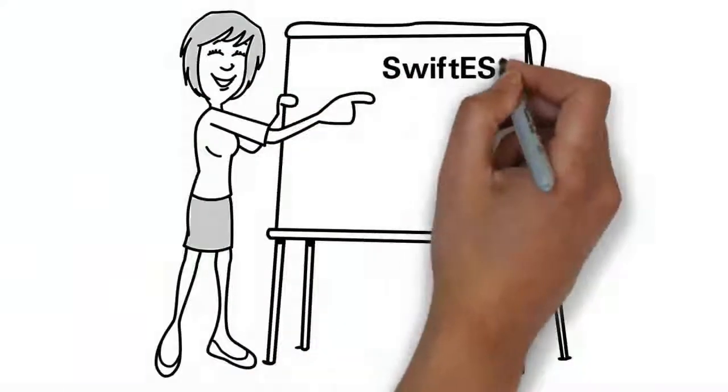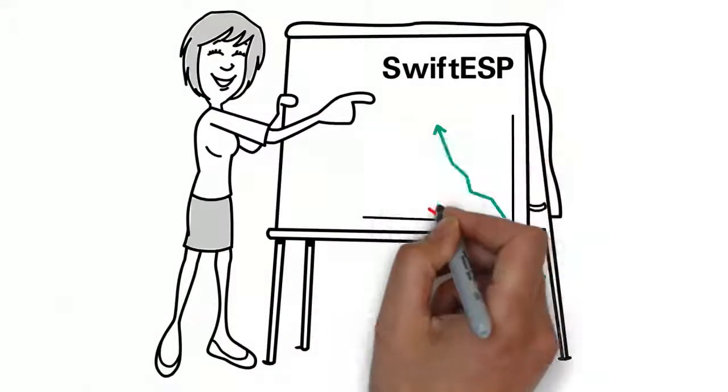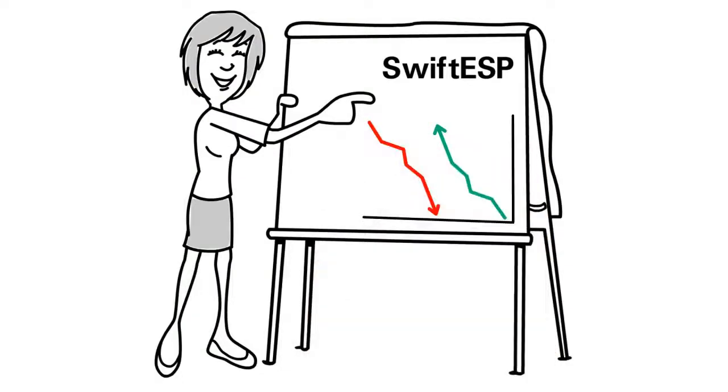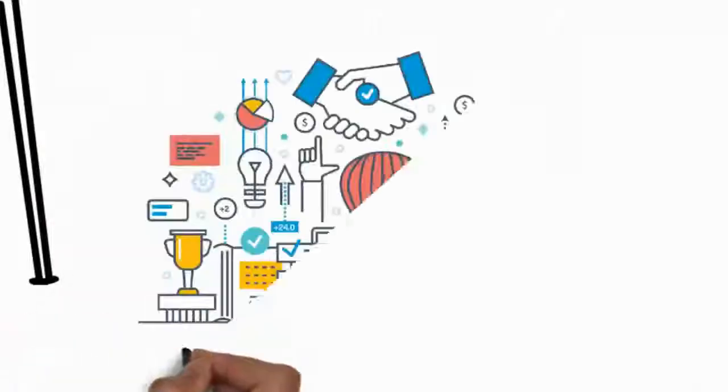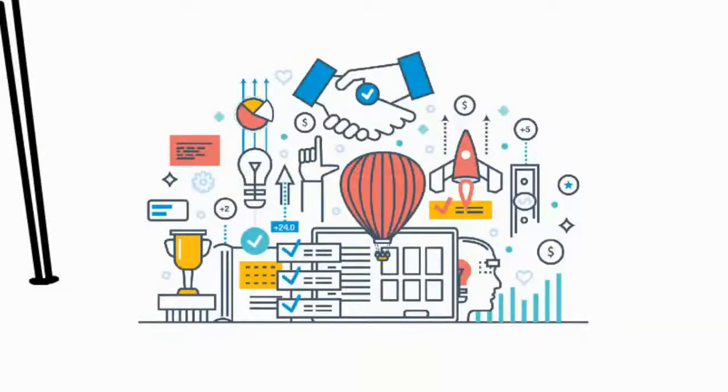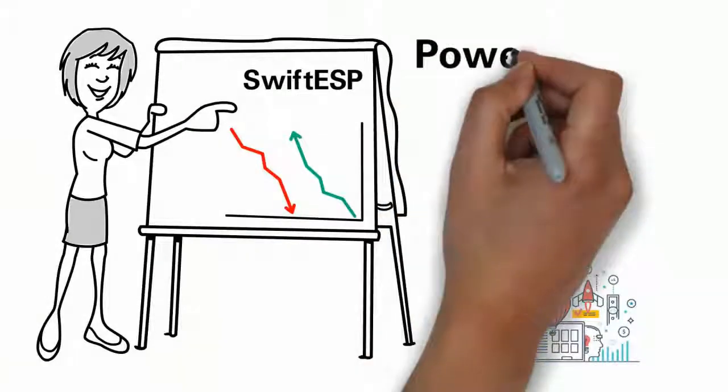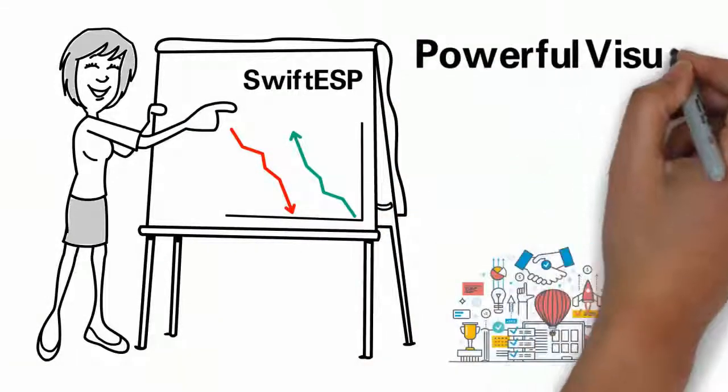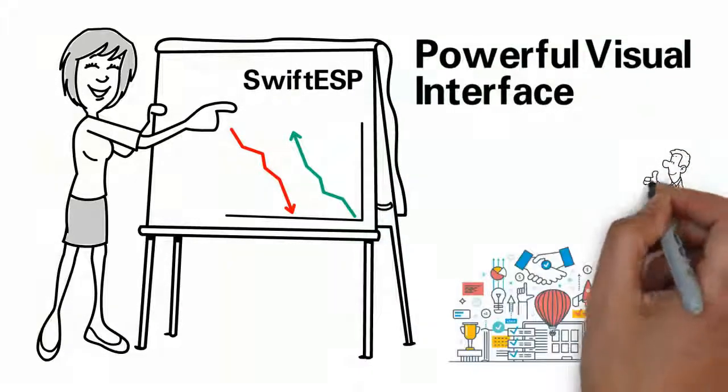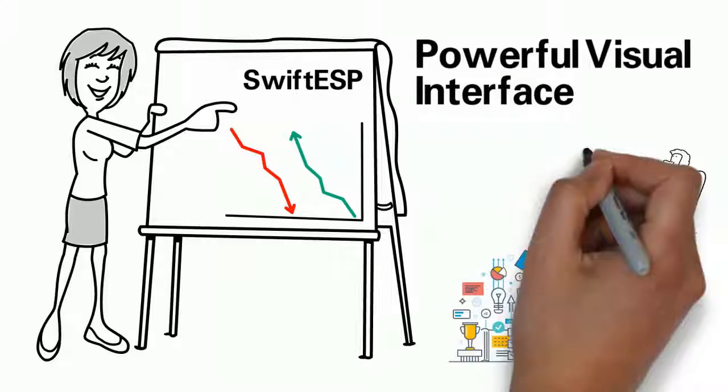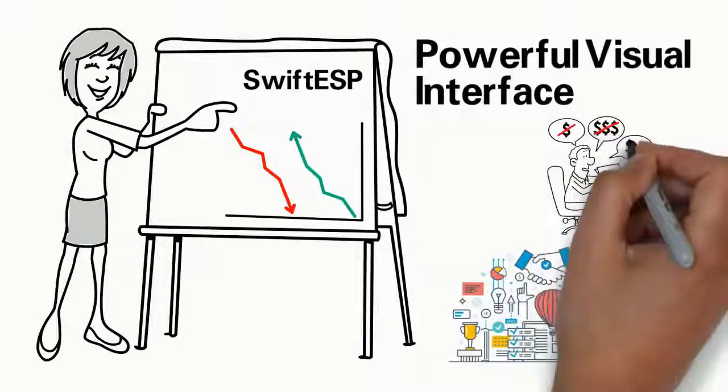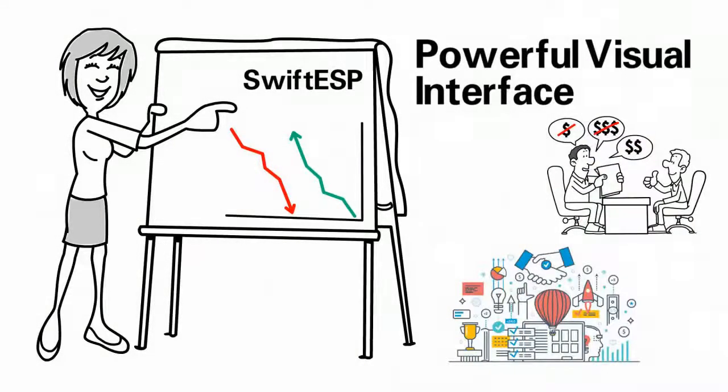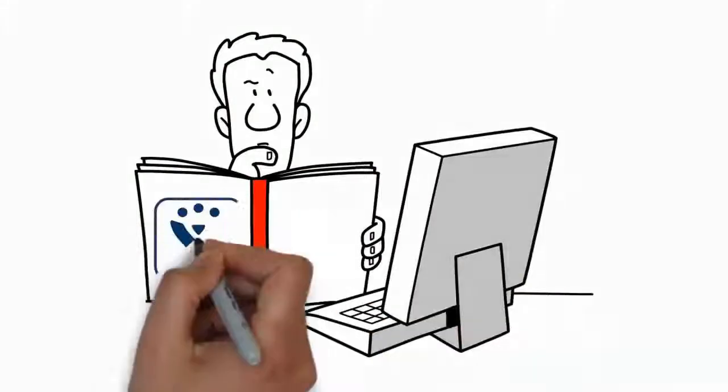Swift ESP also includes a configurable risk asset framework that enables you to assess the risk of various initiatives, portfolios, and projects periodically with a powerful visual interface, ensuring that executive management can make informed decisions about which activities to fund or kill.